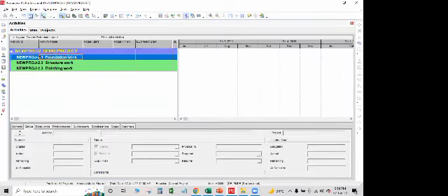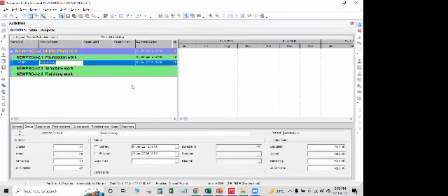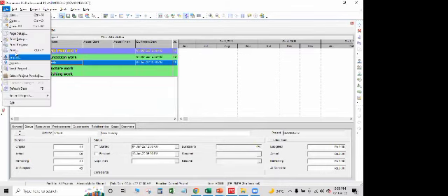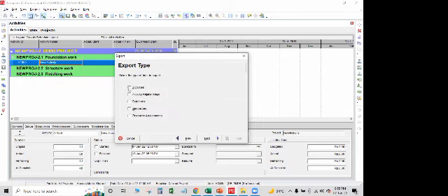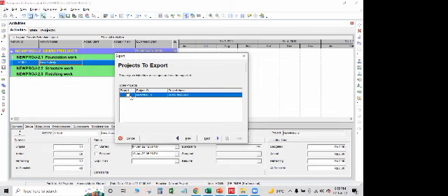All right, so this is how we have WBS right now. I'll put here one simple activity, finish, and I'll go here. And now I'm going to export this schedule. ठीक है, मैंने इसको export किया. मैं इसको spreadsheet के form में चाहता हूँ. Spreadsheet is what? Excel actually. Click here next. I want activities and activity relationship. That's it. I just want these two things for now.